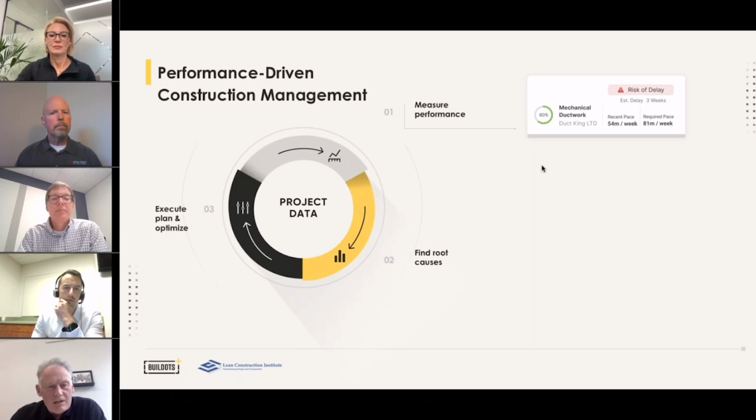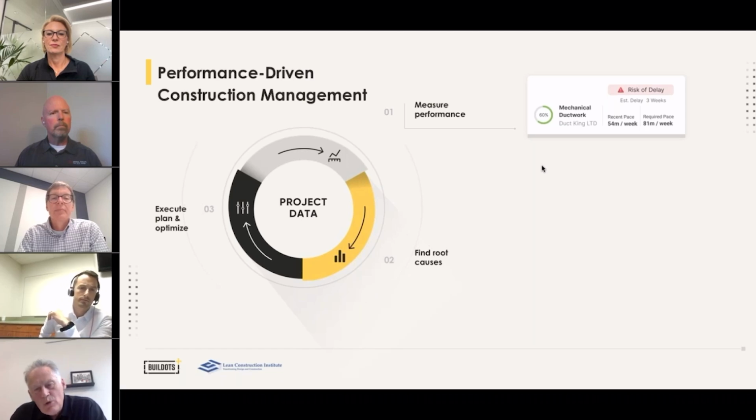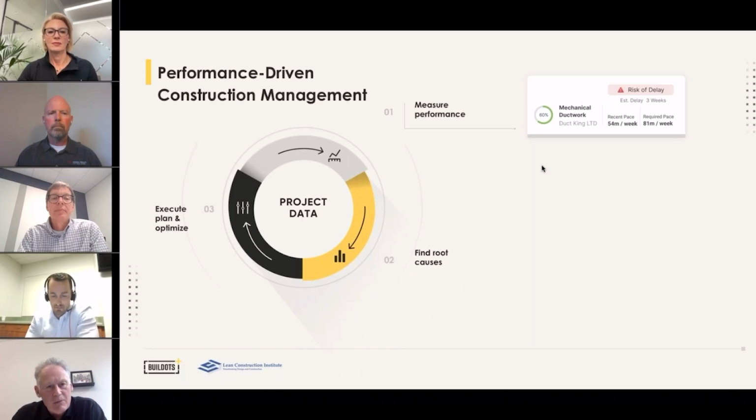It also looked at, you'll be stunned to know, PPC. Those who practice lean will know it's not a shock that what somebody tells you they're going to do next week, and what they actually deliver, is somewhere in the order of 35 to 40% on typical, unless you start to adopt lean principles and drive that figure up.